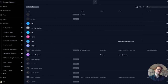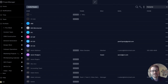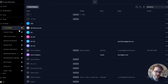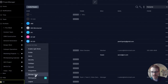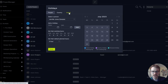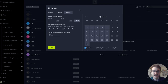Now that you have users in the software, it's a good idea to set global working hours and any holidays so that your schedules have accurate availability for easier planning and scheduling. To do that, let's go to the holidays page. Open the menu in the bottom left, click holidays, then click over to the global tab.